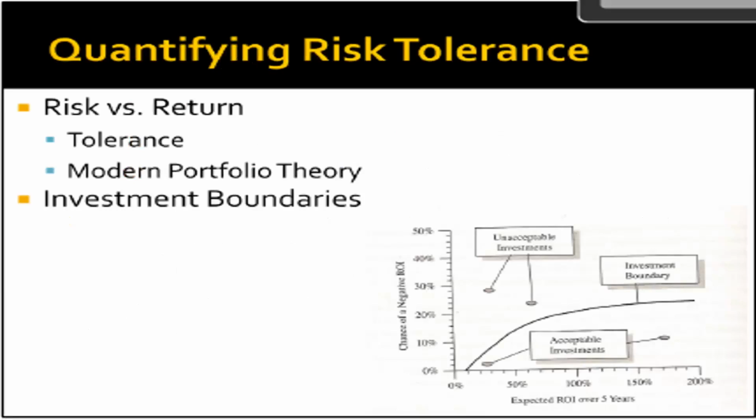Next, we will discuss how we quantify risks. So how do you go about quantifying something like tolerance at risk? First, you need to determine the acceptable tolerance level and then compare it to your project's potential for risk. In order to determine tolerance, you need to know how much risk you or your organization are willing to take. You can sort of think of this as similar to a return on investment calculation, but from a different point of view. In looking at risk tolerance, you are interested in the amount of risk the organization is willing to take to get a certain return on the investment.